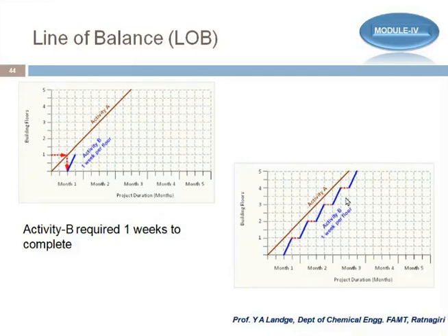Just like I gave the example of the mixer. If you are paying per day for the mixer, and you are only using it on alternate days, then what happens? Ultimately, you are paying unnecessarily to the vendor. Instead of that, can I use it regularly, sequentially, or we can say continuously?